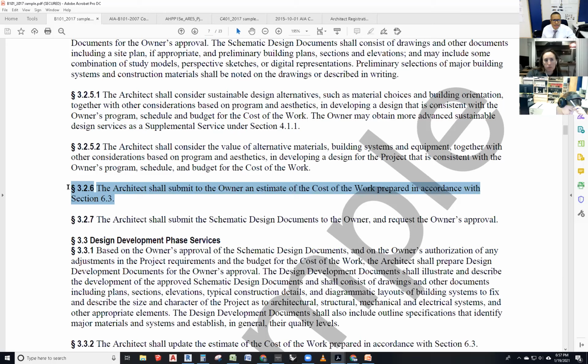What do we use on this estimate to make it? Anybody? Miranda. Yeah, wouldn't it just be to schematic level, like the size of the building? So what do we use? Maybe a costing program? No, but what nomenclature or units do we use to be able to price this building? In square footage? That's right.